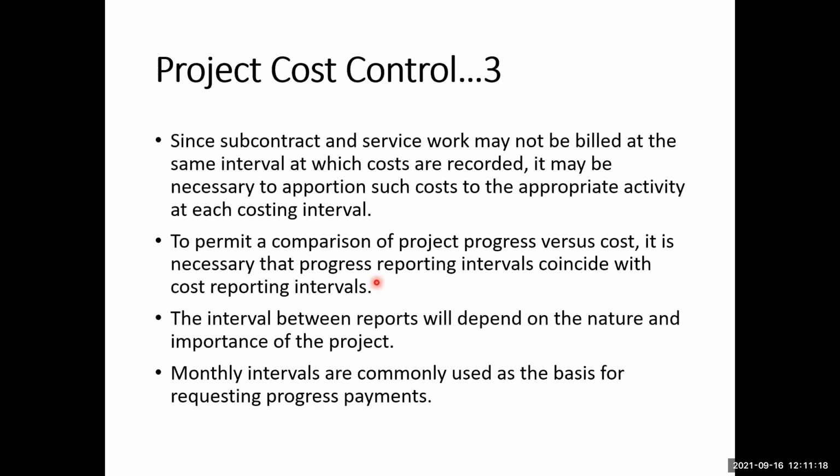The progress reporting is in terms of how much work on certain activities has been completed. Maybe on a weekly, bi-weekly or monthly basis, such reports are prepared. In parallel to that, the cost reporting interval should also be kept the same. Or in a more ideal situation, the cost reporting should be integrated into the progress reporting. Then it will be an ideal situation.